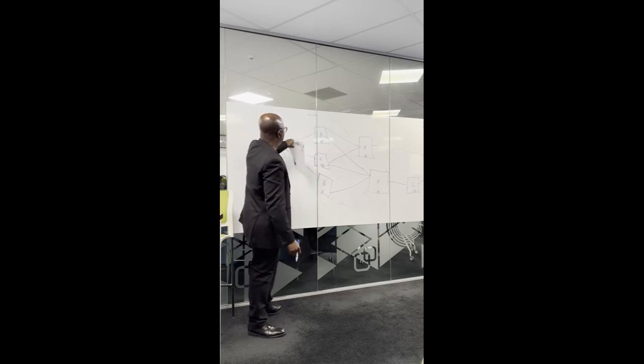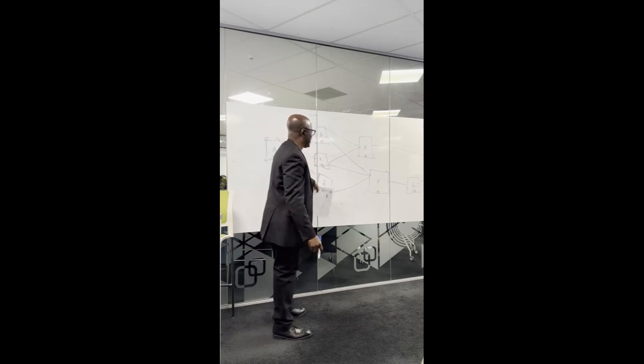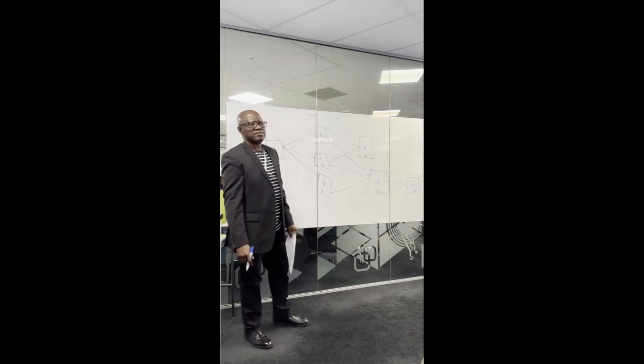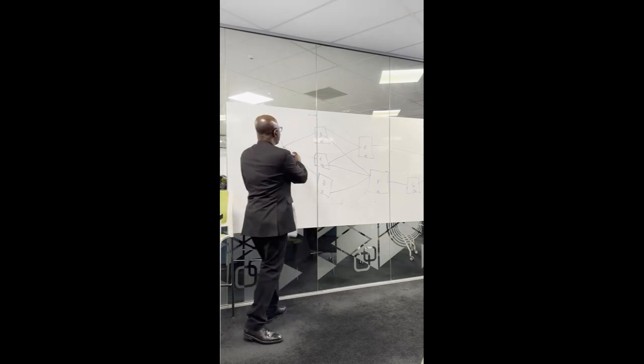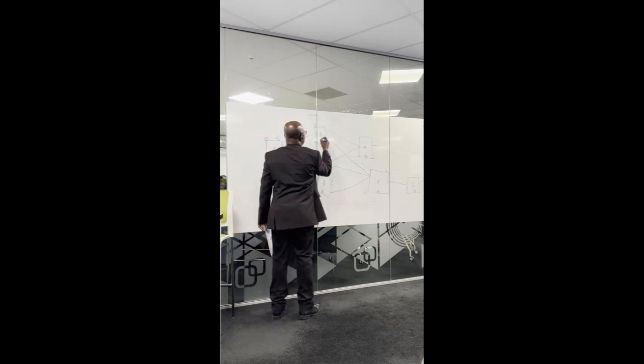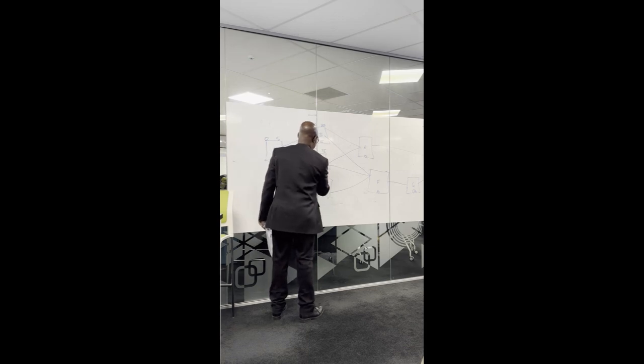Now, this preceded this and this like that. So meaning that all these 3 activities cannot start until when? A finish. Because they took off from A, each of them. So 5 here plus 5 here, 10. 5 here plus 15 here, 20. 5 here plus 10 here, 15.